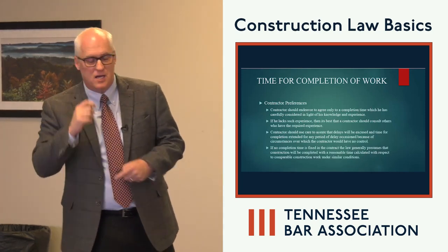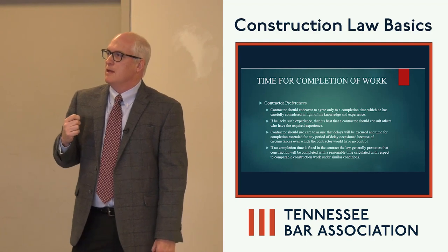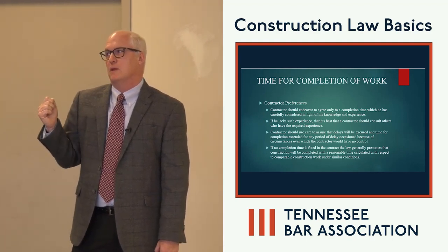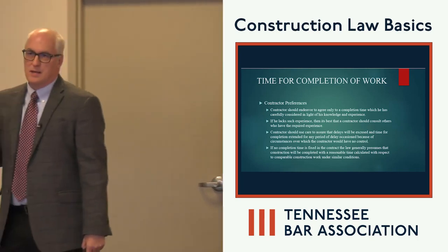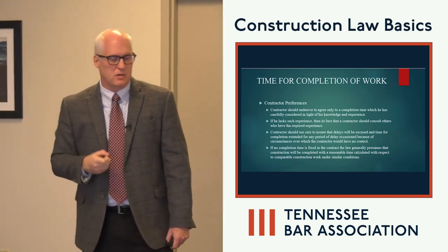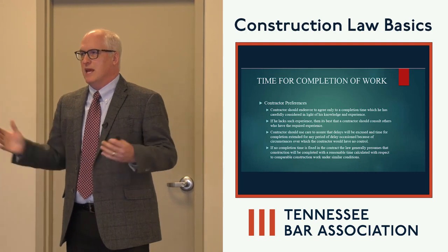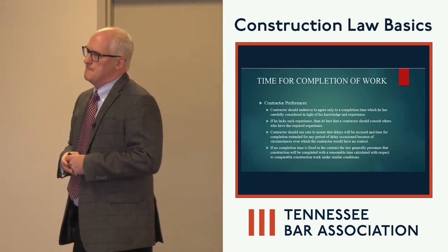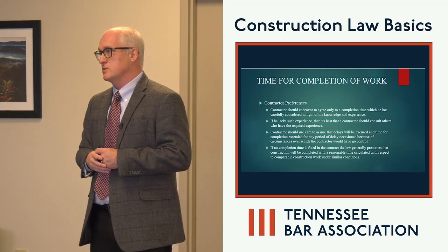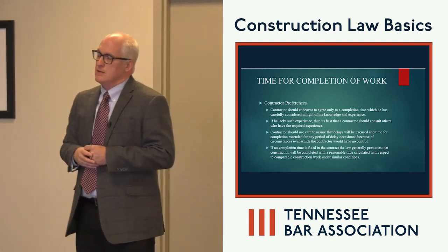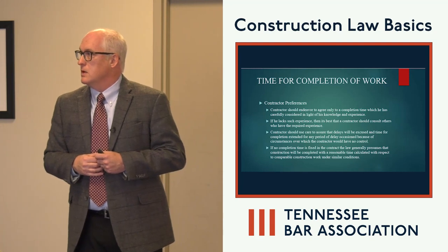Contractor preferences. I don't know of any contractor, at least mine, that wants a set time frame within which to complete a project. This is an issue of deep conflict between the owner and contractor, obviously, and there probably should always be a situation where the contractor is going to put some language in there that's going to give them an out, for acts of God, labor shortages, material shortages, whatever the case may be, if and to the extent the project's not completed within a particular period of time. Obviously, the contractor is going to want some language in there too that if the contract isn't completed, and that's on the fault of the owner, that protects the contractor on that front as well.